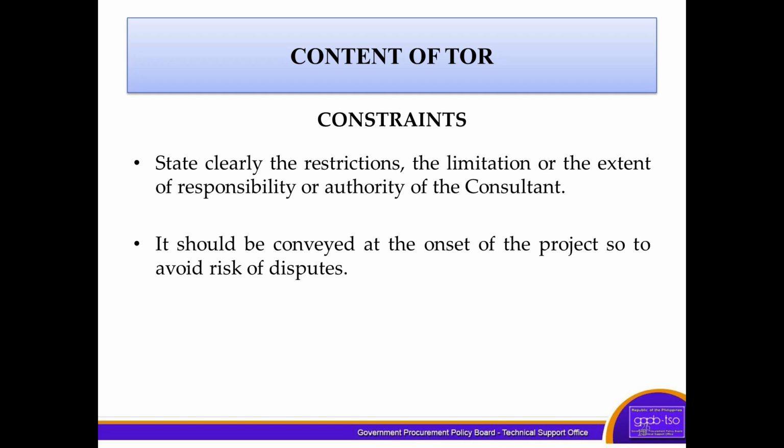One of the possibilities that could arise from not clearly stating the restrictions is that there could be no takers for your consultancy services because of too much responsibility set in the TOR.